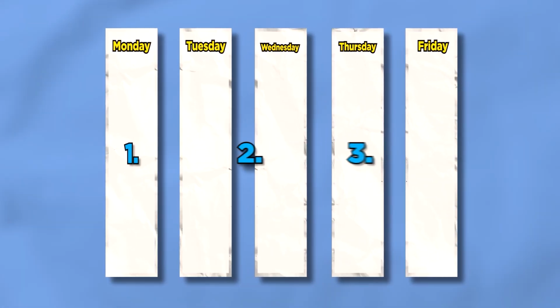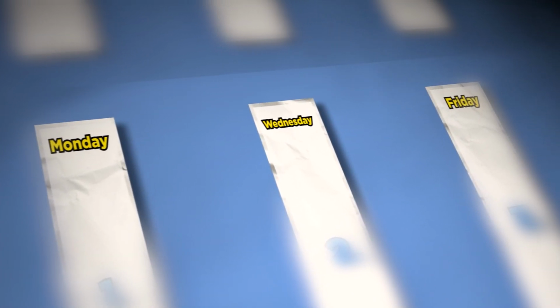Another big point to make sure is included in the schedule: have a conversation with your builder before starting the work and ask them if they included a float in the schedule. A float is an extra little bit of wiggle room and time that's baked into the schedule so that if something were to happen, because something always happens, it doesn't derail the project completely or push out the completion date that far. These are things the contractor should already be thinking about, but as a client, you can do your due diligence as well and say, hey, is there a float included on this schedule? Or are we running things bare bones?